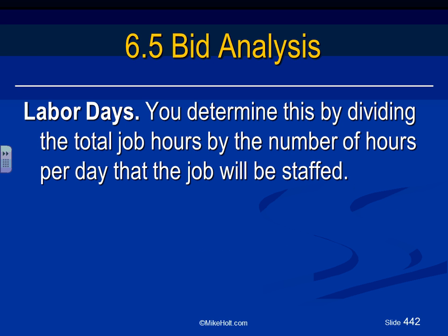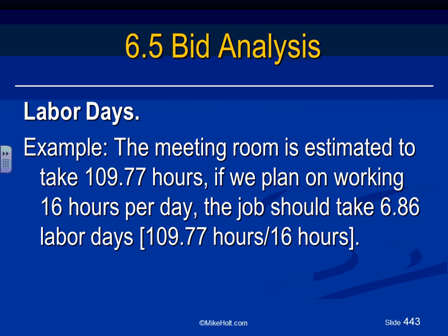Okay, labor days. Labor days, guys. So what they do is they take, like we said, the labor hours divided by how many hours of man or woman hours you're going to work, and you come up with a value. That will tell you how many days you need to finish this project.